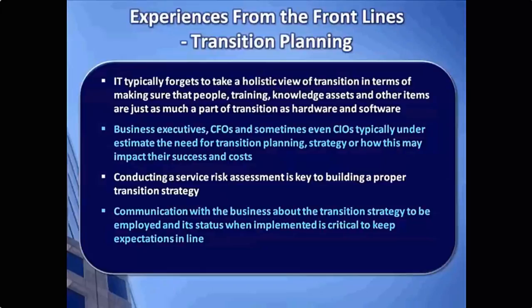Conducting a service risk assessment is key to building a proper transition strategy. So as you're putting your strategy together for how you will transition this solution to production, you may want to do an upfront service risk assessment, look for all the likelihoods and possibilities of risks that can occur, and then include that as part of your transition strategy.